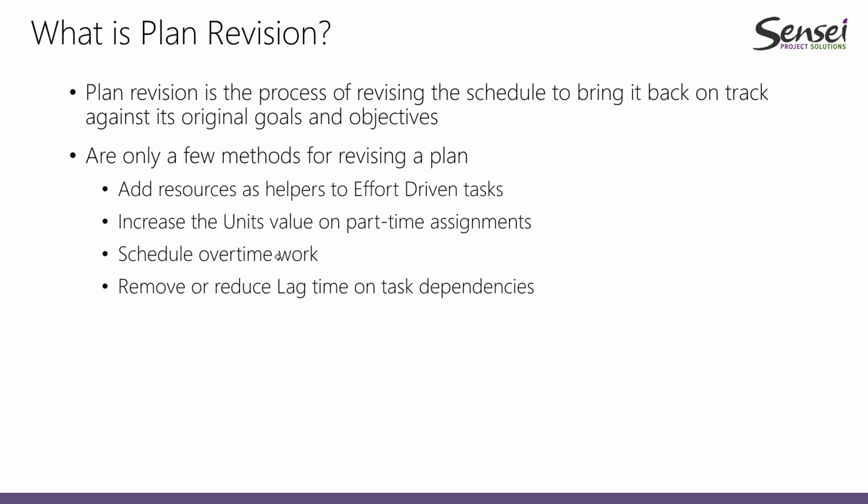So there are only a few methods that we can use for revising a plan, and I will just go quickly through each one of them. We might add resources to help reduce the time of effort-driven tasks. We might increase the units value of a part-time assignment. So if a resource is working, for example, 50% of their time, we can increase this a little bit. Then the resource can put more effort on the task and bring it back on track.